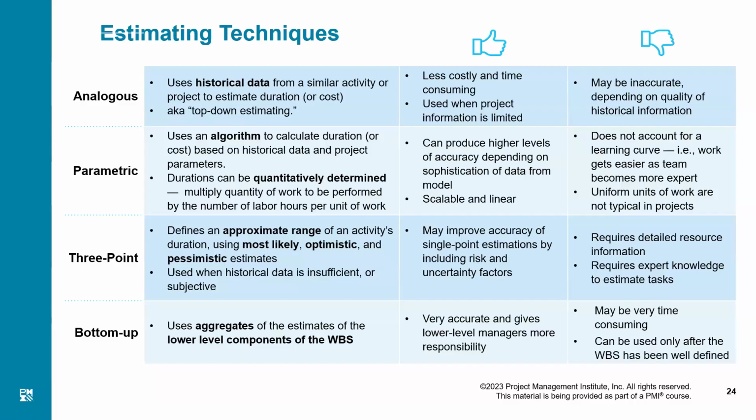You have to know for the exam, comparing to all these techniques, the most accurate estimate you will get is from bottom-up estimation, because you are going to the activity level, you are considering the constraints there, you are looking into assumptions and so on, and you are calculating at the activity level, which you then roll up to the higher levels.